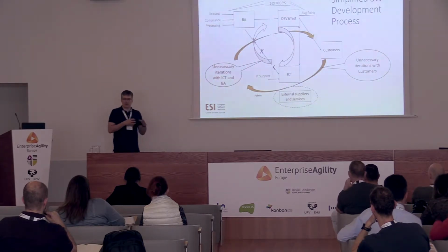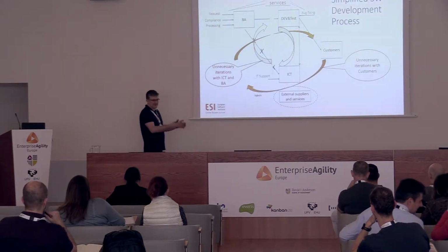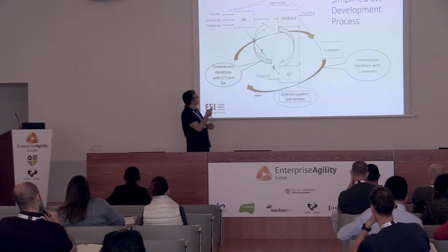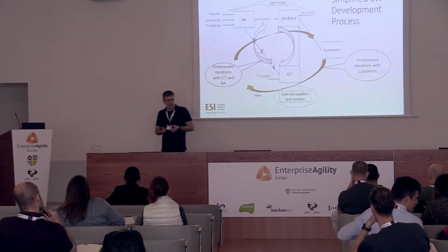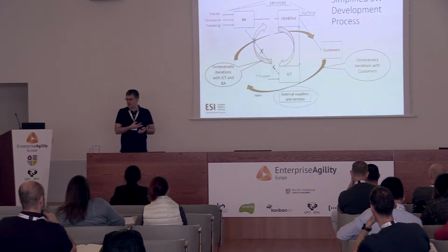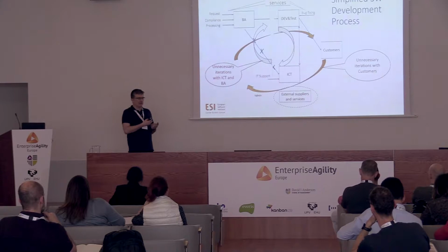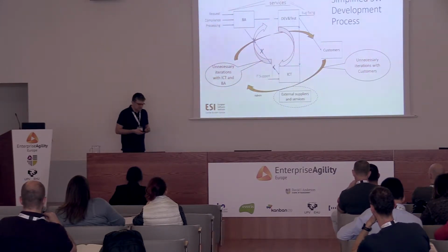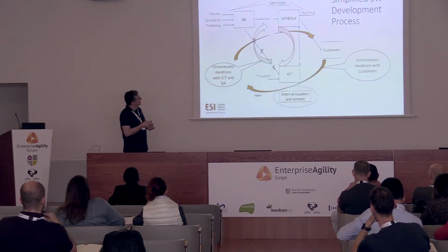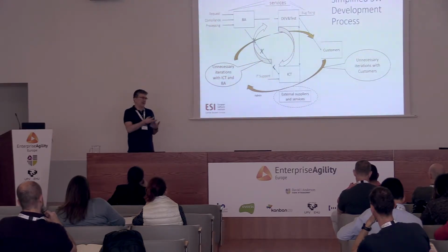And when you have this push from the clients, business analysts are doing their job, and between the business analysts and development, you see plenty of analyzed features and requirements that are waiting for the development capacity to process them. And as it always happens, the requests with highest priority are served quite fast.